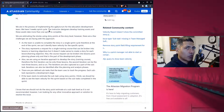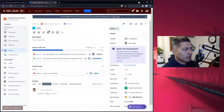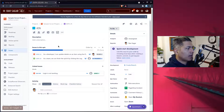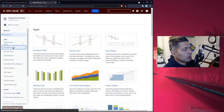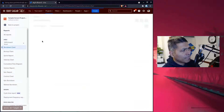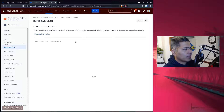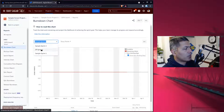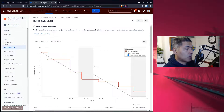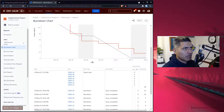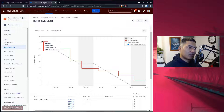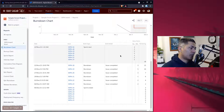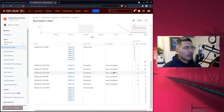In Jira, whenever you're using Jira Software, you can use story points, but story points work at the story level. If you're looking at any reports — for example, burndown charts or velocity charts — those reports are going to focus on story points at the story level. When you start your sprint with 17.5 story points and keep burning them, you're burning at the story level.